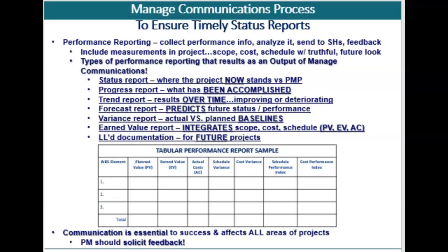We talked about that in cost management a little bit when we talked about estimate to completion or estimate at completion. Those are forecasts. A variance report compares the actual results, the actual data, versus what you planned. The baselines are a good example of that.